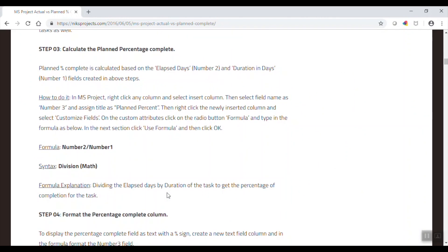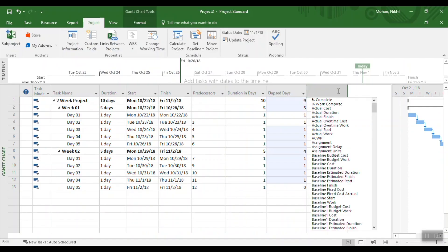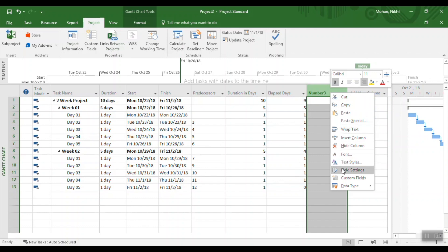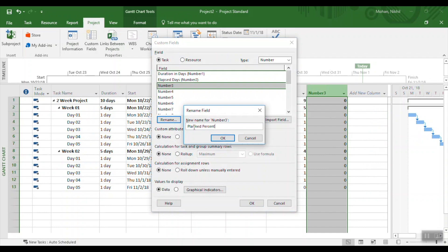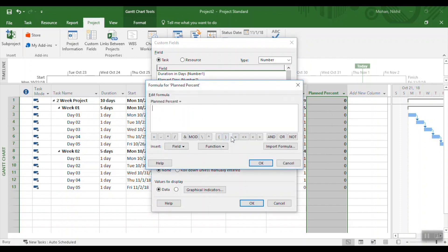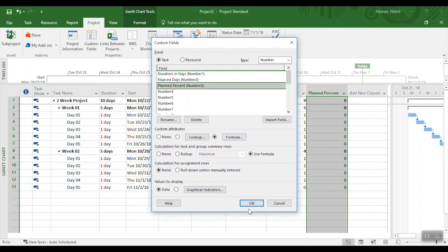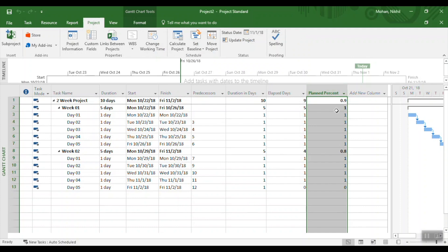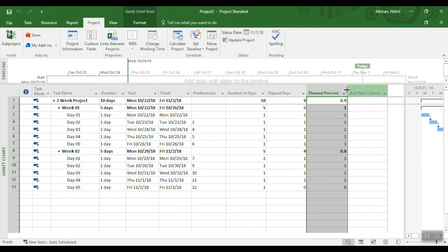Going back to the website for Step 3 — calculating the Plan Percentage Complete. The formula is simply Number2 divided by Number1. Insert a new column called Number 3, go to Custom Fields, rename it as 'Plan Percentage,' click the Formula radio button, type Number2 divided by Number1, apply to summary rows, and click OK. You now have the Plan Percentage Complete — it's showing 90% complete at this status date.